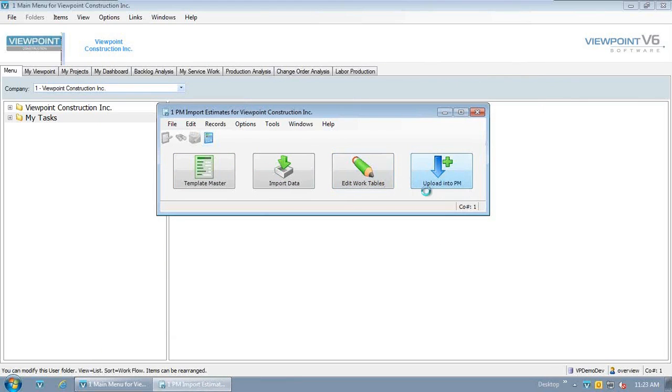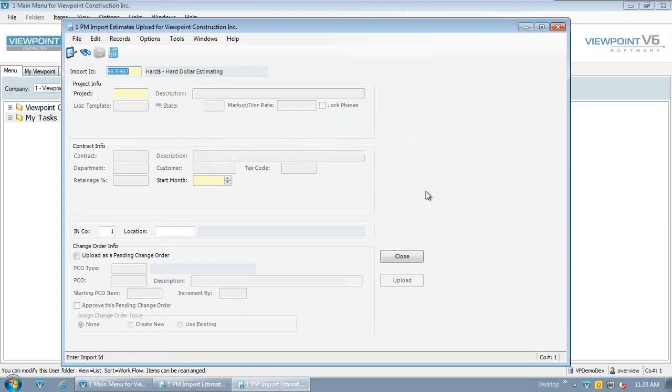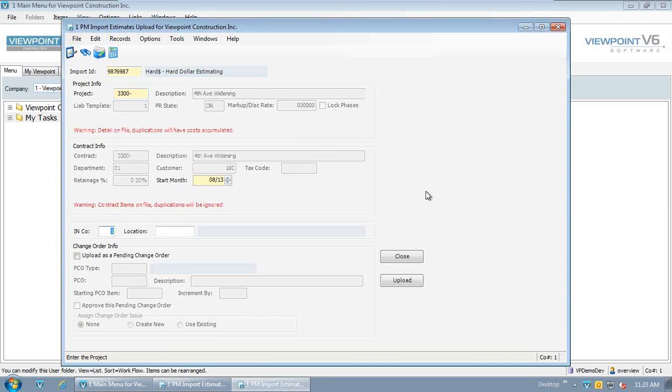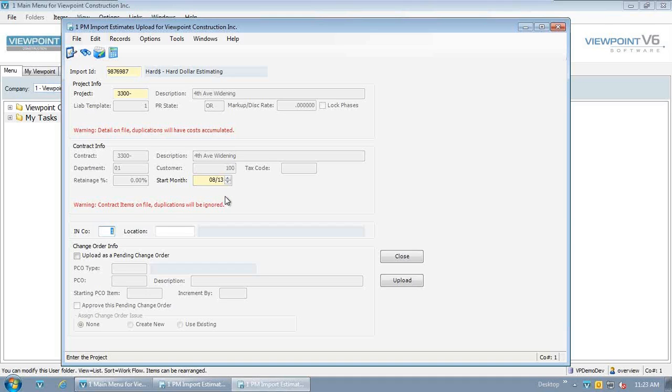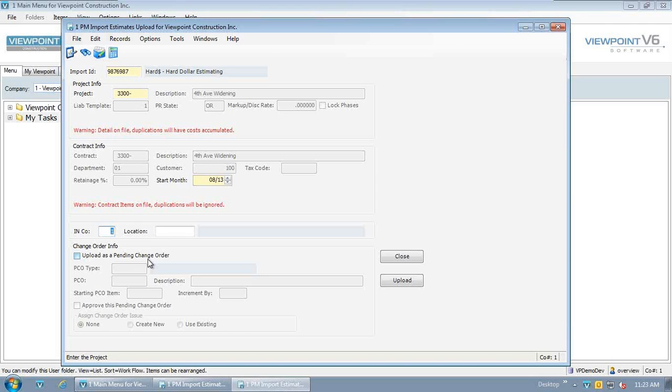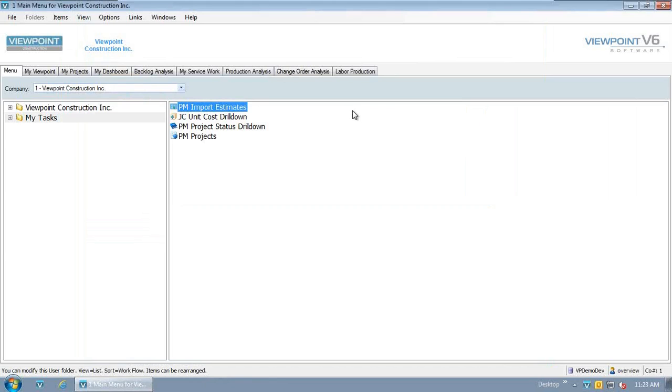So the import estimates tool allows you to go through, pull in your file, do some error checking and review. If you need to make any modifications for whatever reason, you certainly can. But we do need to give you the options to do those things. And when we're ready, we can go through and upload it right into the project management system. So I can go through and assign a project number. I've already done this earlier today, but it'll go through and set up that project for me. If you're re-importing it, it will modify the existing. So if you did make any changes, you can do that no problem, as well as down the road. If you have a change order coming up on your project, you put together an estimate for it in hard dollar, and you need to be able to pull that into your job so you can properly bill for it and track the cost, you can import change orders as well, which can be a big help, especially if you've got a large change order.